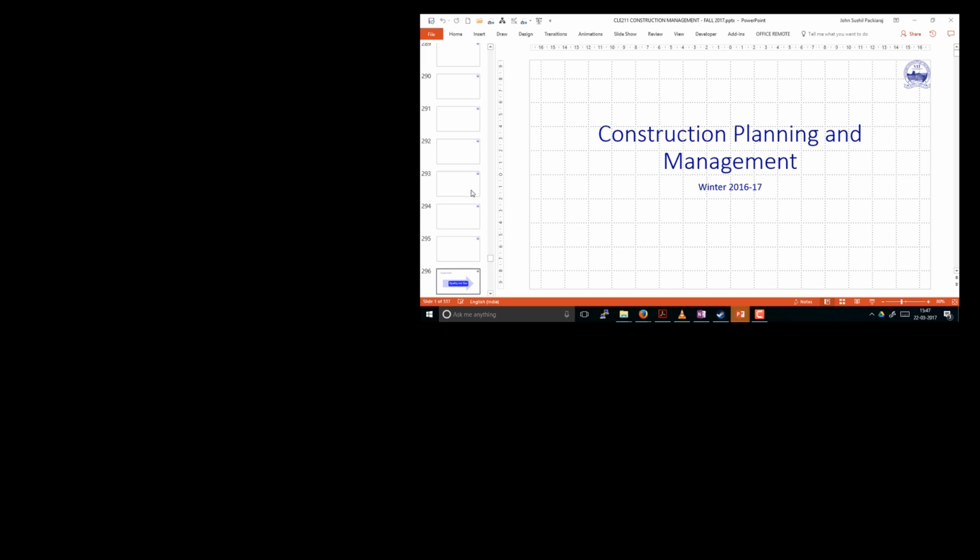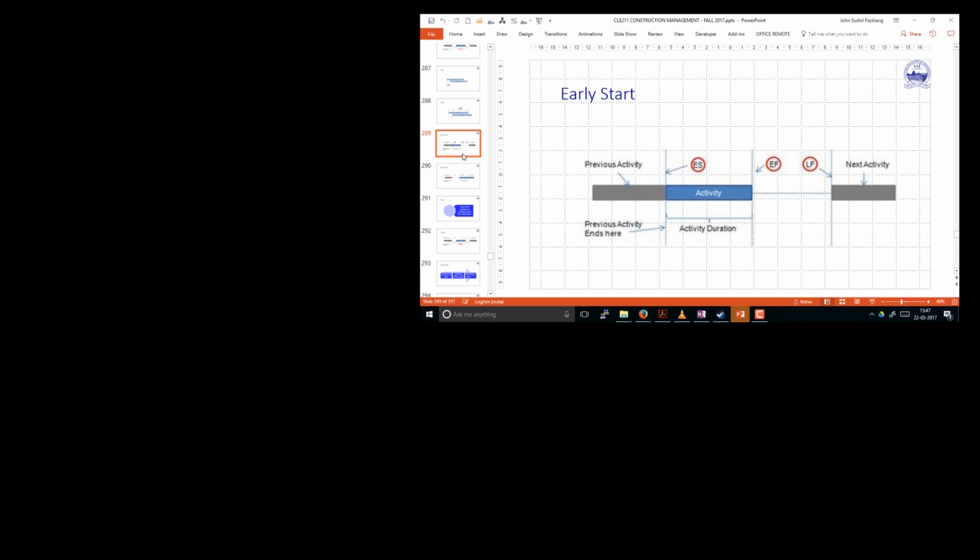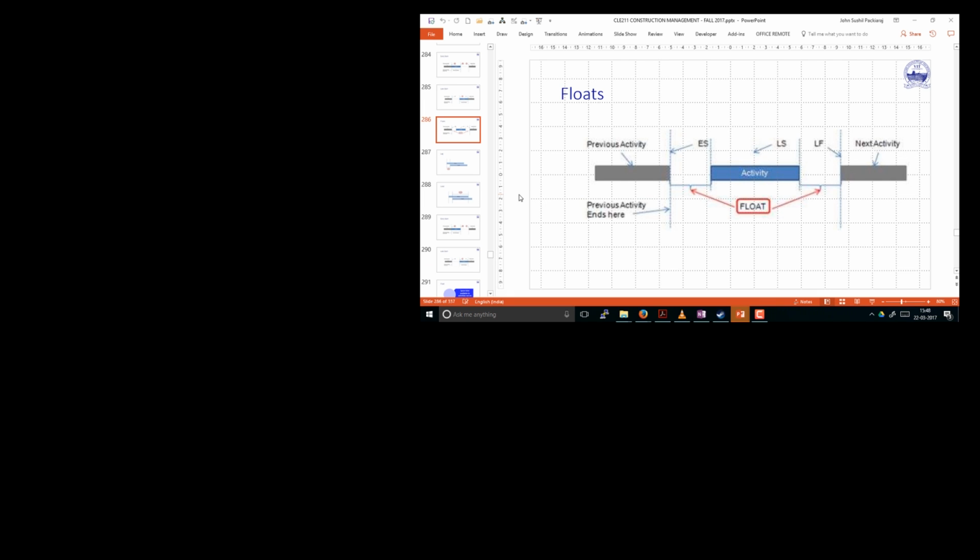Right. So if you look at this slide, you will find that there are certain activities, for example the first activity, like design, you could move it wherever you want, a little. So such activities have a float. The thing about this is you can either keep it at the last or you can keep it at the beginning. Essentially I want you to just know that you can have a float whichever way you want. This is in your control.